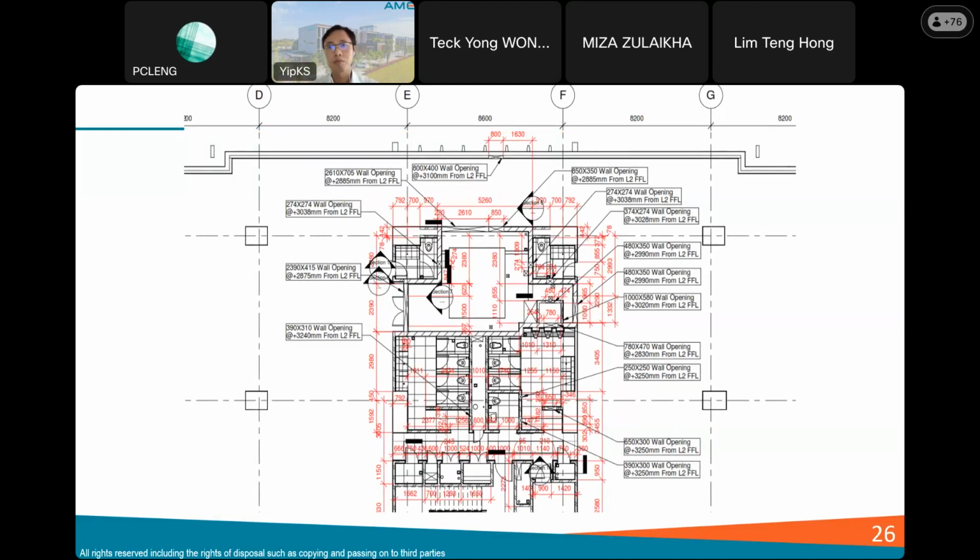After we have fully coordinated 3D models, the team will generate this kind of detailed setting out plan and give it to the site execution team, like the site workers, to allocate the openings for each wall opening with each dimension.